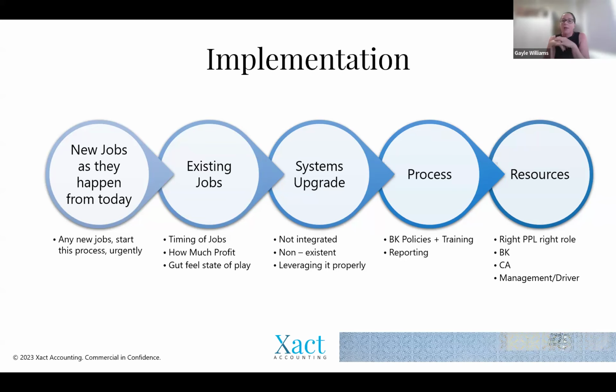So it's looking at, what are your internal processes? Who's raising POs? Who's approving them? Are they matching back to estimates? Who's doing your estimates? So there's a whole bunch of internal admin processes to really review here and get all the checks in place so that you can start catching any overruns or any variances as early as possible.